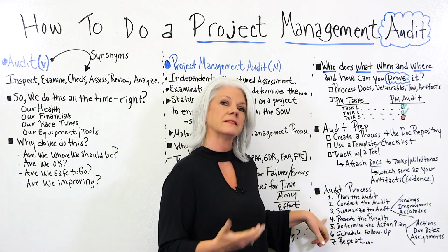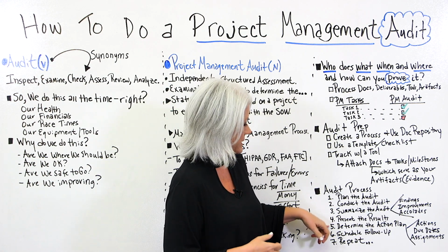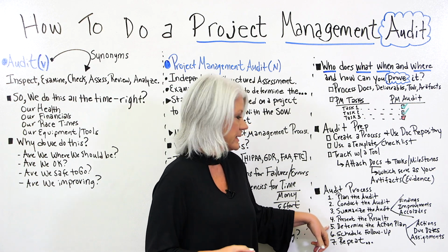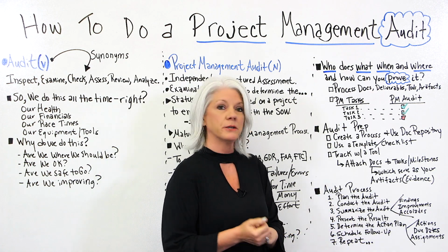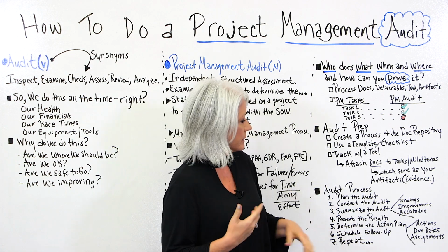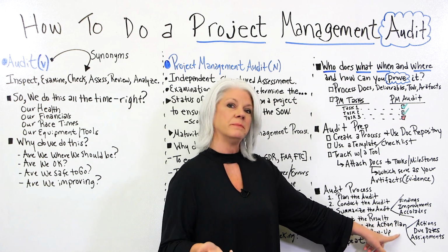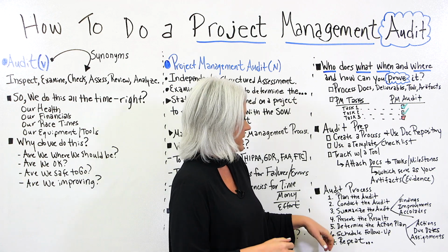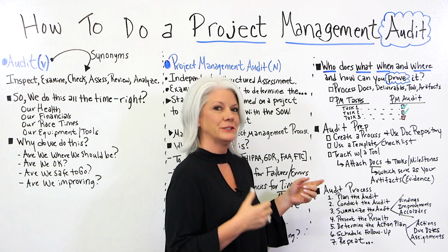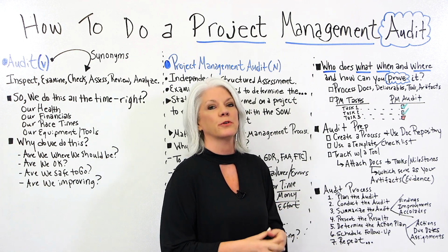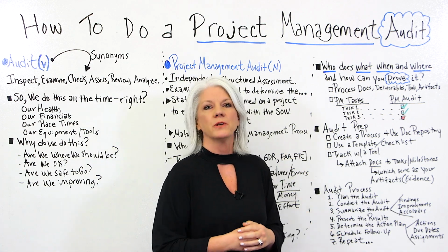Then we want to present the results to the team, the stakeholders, or the people who need to know. And then number 5, determine the action plan. From the findings or improvements that you see could be made, you want to be sure to put a plan around that so you know what actions need to be done, when they need to be done, and who needs to do it. And then schedule the follow-up, and then you go back and you rinse and repeat. You actually do it again. So that's continuous improvement. And you can see that that's very valuable to not only the project, but the organization and the team.